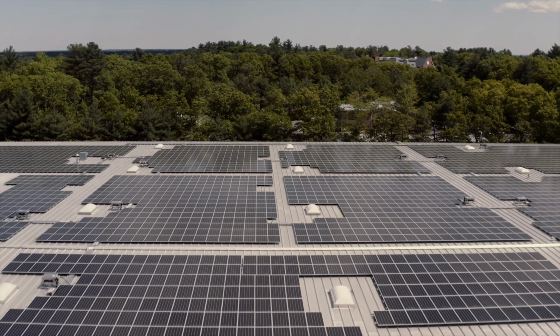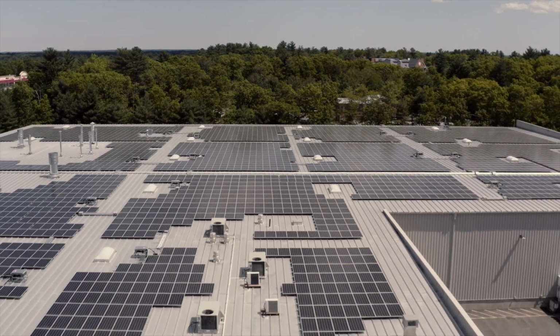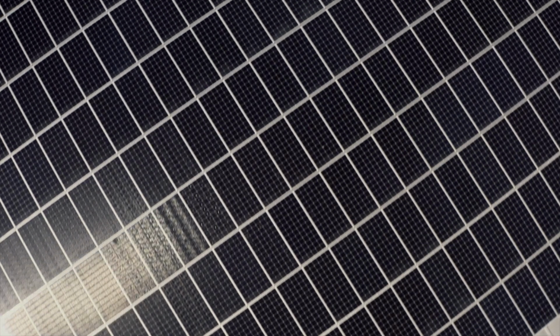When we go on site for a new rooftop project, well, the first thing we do is provide an access point to those rooftops. We provide fall protection around the roof perimeter, in order to prevent any potential falls. We then, at the same time, provide emergency guidance to those employees that if we were to have an event, how to safely exit the roof and to meet at our central meeting locations.